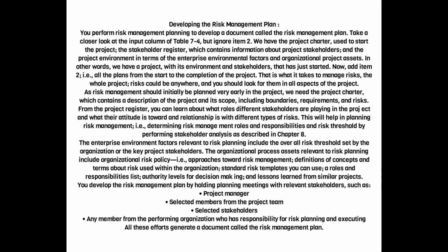The enterprise environmental factors relevant to risk planning include the overall risk threshold set by the organization or the key project stakeholders. The organizational process assets relevant to risk planning include organizational risk policy, i.e., approaches toward risk management, definitions of concepts and terms about risk used within the organization, standard risk templates you can use, a roles and responsibilities list, authority levels for decision-making, and lessons learned from similar projects.